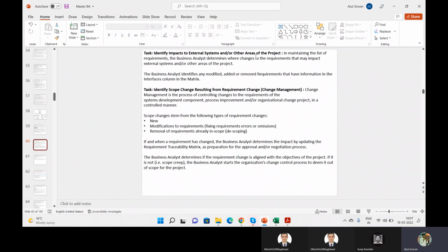One person of mine sits in the US, he runs 12 hours behind me. Now you have to understand that as well, whether it's an external or an internal system. Because my team sits in the US, my client sits in the US. If I log in during Indian morning time, I have to wait the complete day to get the requirement clarified. One of the areas for the scoping part, you have to define whether we can have a BA or can build our team as per the US time zones as well.